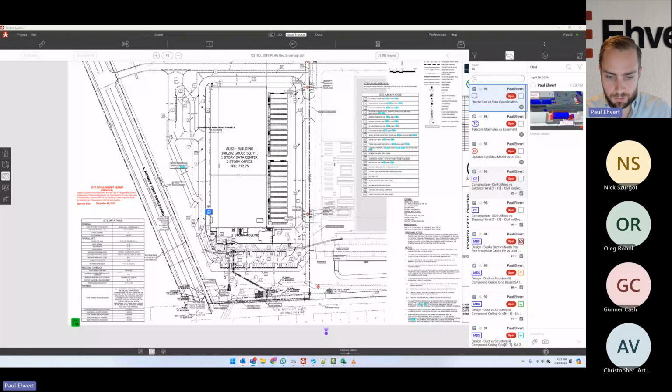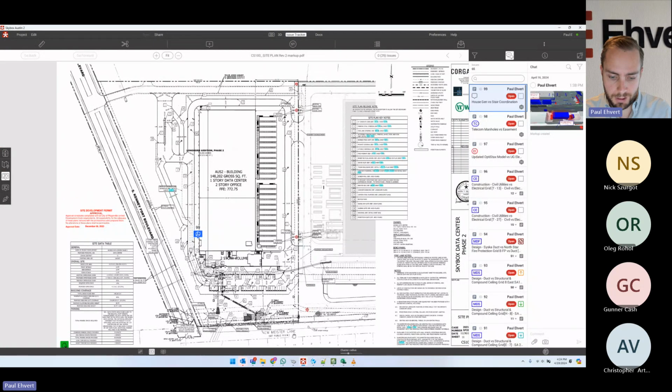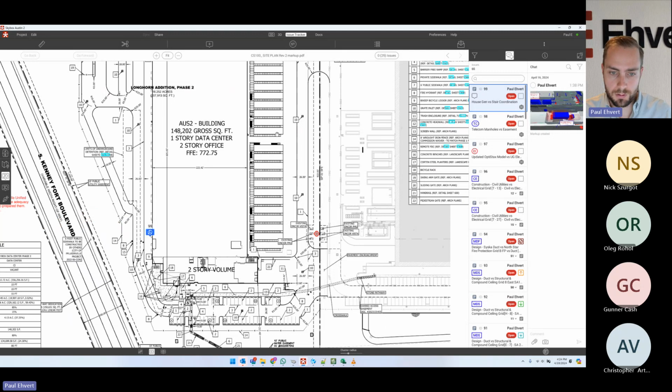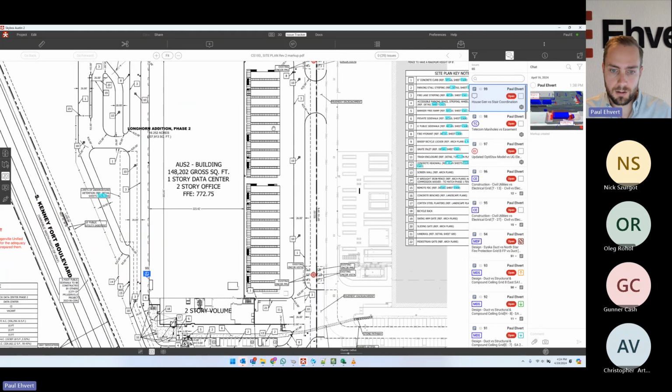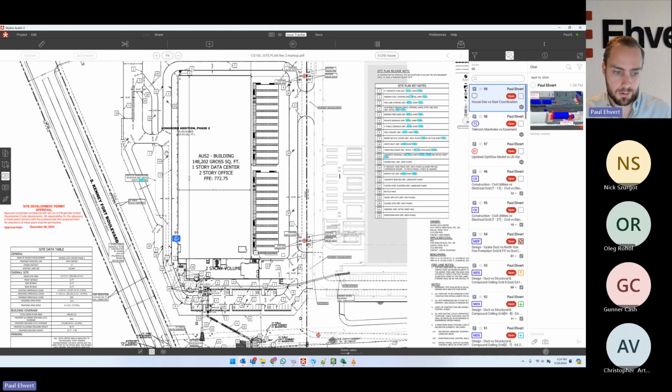Perfect. Okay, so if I go back to sharing my screen, they will come in, I'm not showing it on this plan, but they'll come in from down here on New Meister Lane and come up north. We start phasing, so we go from south to north. Phase one group, then phase two group, come to the north, and then trucks will circle around and come back out that same entrance. Now, Paul, here's the deal: the OptiStacks are grouped by 3, so the supply will be by 3 units, 3 stacks.